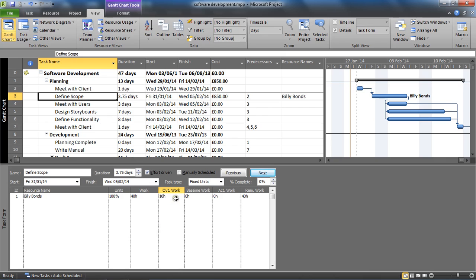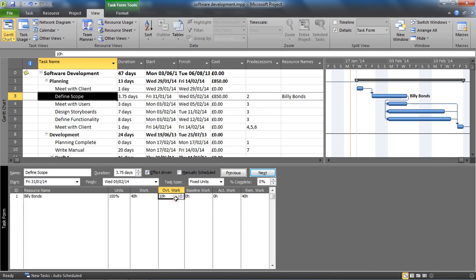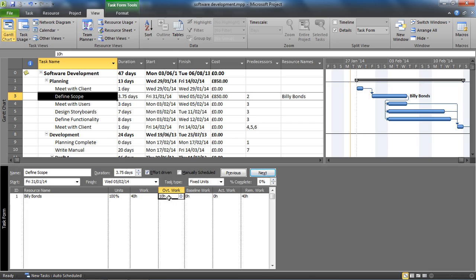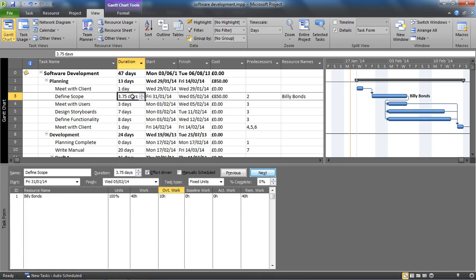This overtime work - the work column is inclusive of that 10 hours. So he's now doing 30 hours of scheduled work and 10 hours of overtime work, making the 40 hours. Because of that, the duration has dropped to 3.75, which is quite a common thing. It's assumed that if somebody's doing overtime, it's to get a job done quicker.